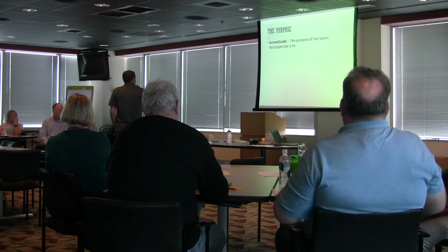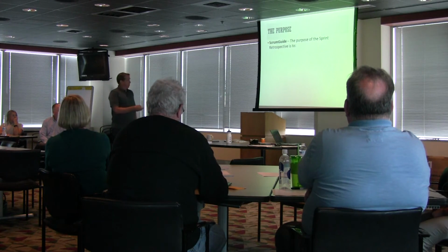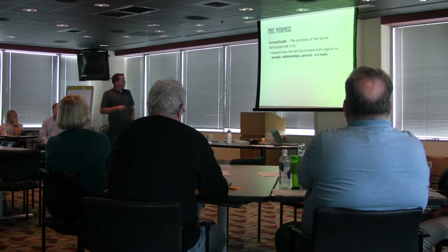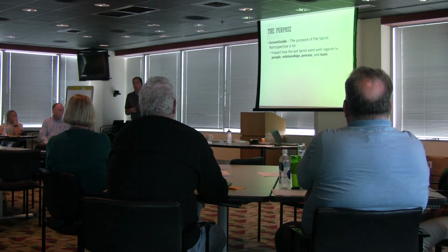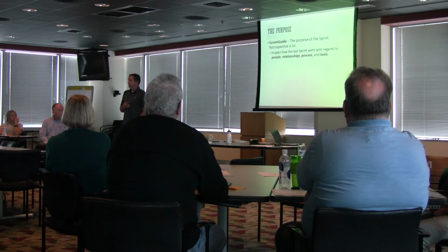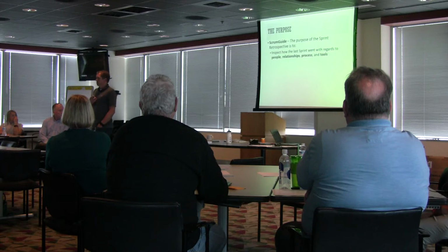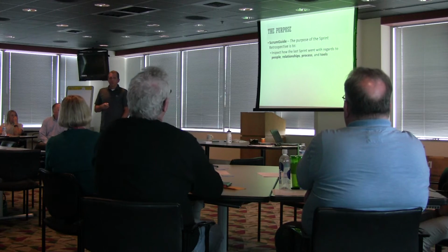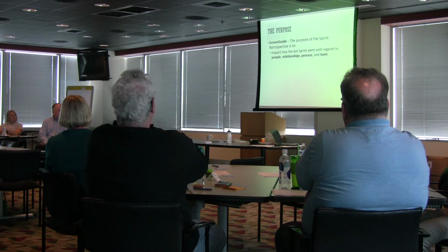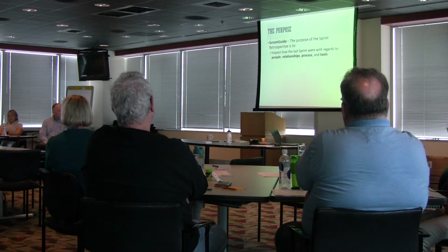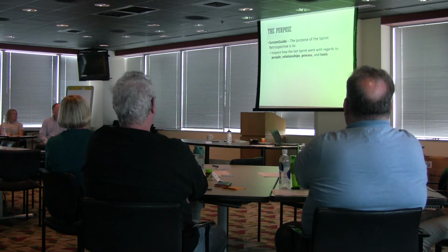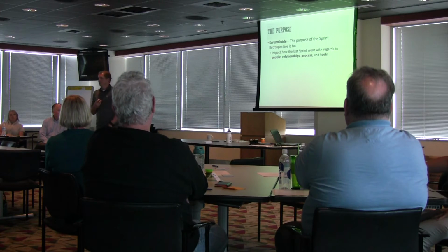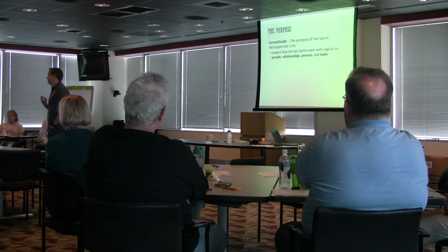In the Scrum Guide, it talks about the purpose. To inspect how the last sprint went with regards to people, relationships, process, and tools. Did we talk about all these things in our retrospectives? No? Where do we focus? Where do we generally focus? The work. Yeah, those are easy, right? Why are they easy? It's not personal at all.